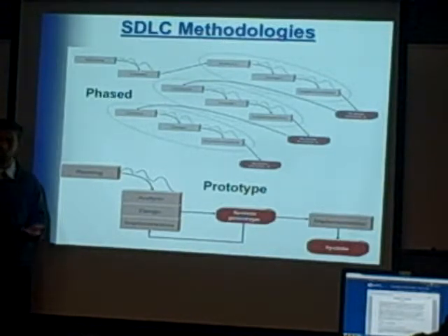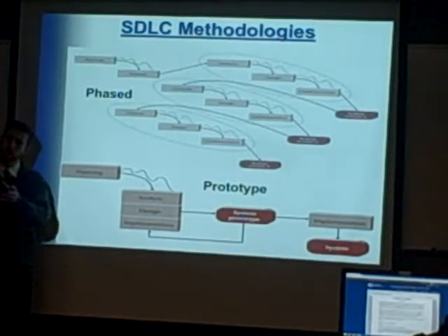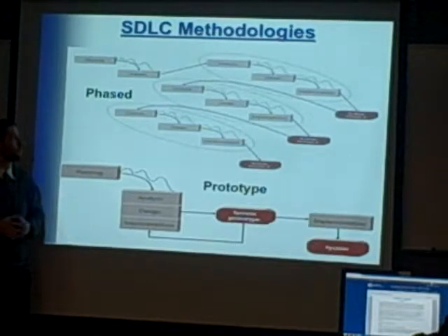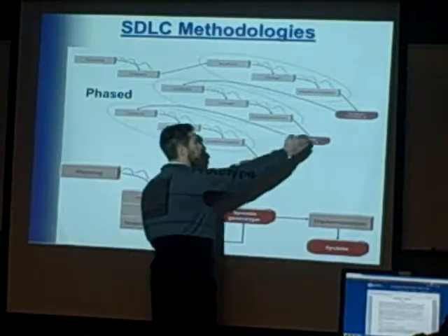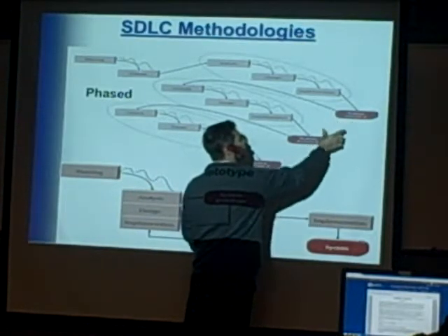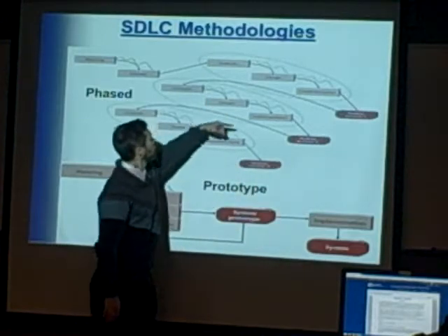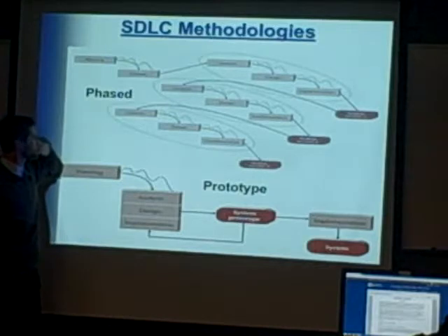And so one alternative approach we would take is, well, what if we broke that into sections? They'd say, okay, well, what could you give us in 3 months? Could we have a new iteration in 3 months? And then we'd negotiate, okay, here's the subset of features that could go into 3 months. And so that would be kind of a phased approach. We'd say, okay, let's talk about our rollouts for the next 2 years. This is what we could put in version 1, version 2, version 3. And so it's just an adaptation of the waterfall approach.